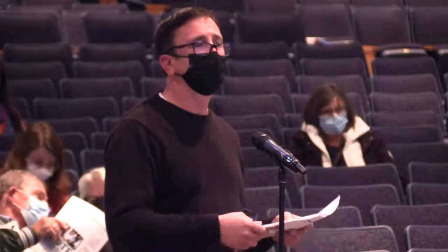At this point, they're just estimates. They're based on the conceptual design. There will be more detailed estimates as we go along in the process, finally culminating with the bid documents, where the contractors will bid against themselves in order to get the work. So right now, these are just placeholders as we estimate what the worst case scenario could be. It could very well be, as we've seen at the Wellwood project, ahead of schedule and under budget. Yeah, and knock on wood, I hope it happens again.